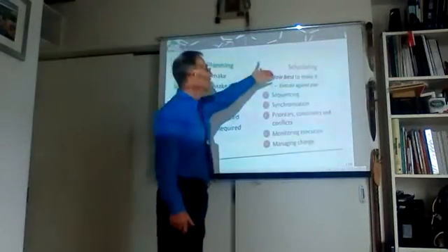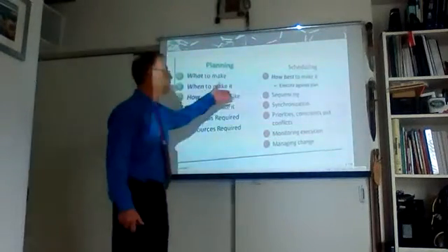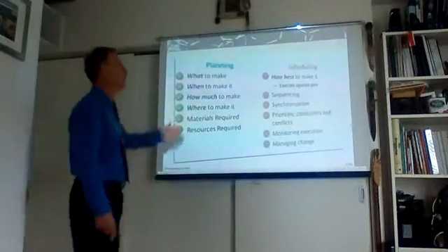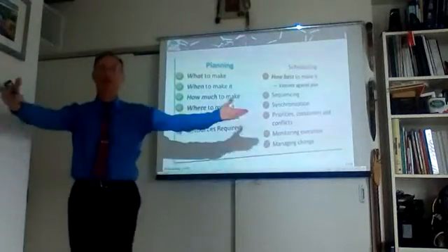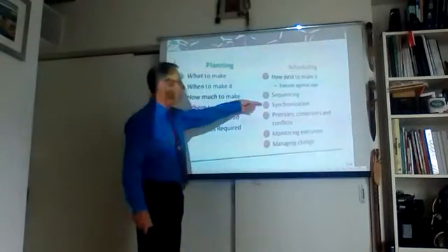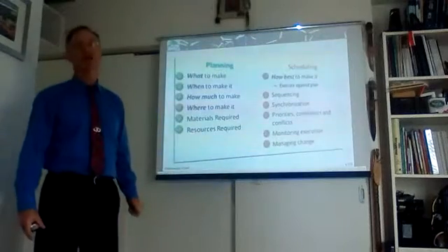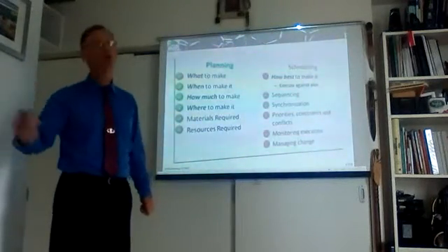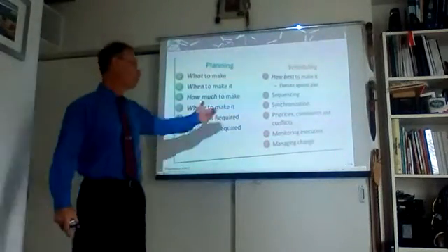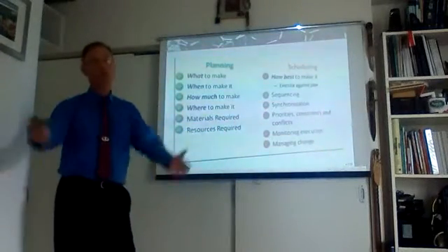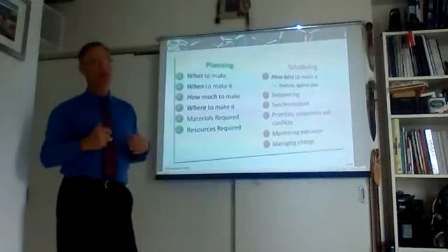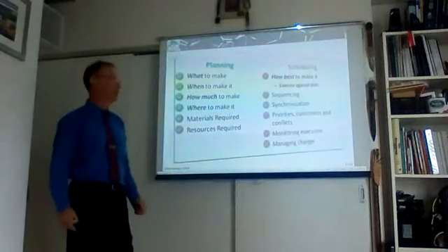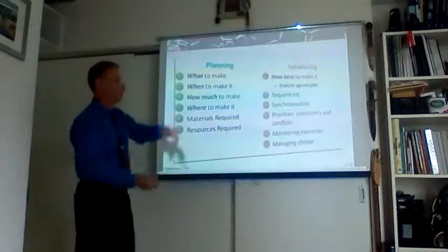When it comes to the scheduling, how best to make it? What is the right sequence? What comes after A? B, and then C, and then D. Very important. You are the expert. You will do the scheduling. Synchronization between departments and professionals. You know that you're supposed to disassemble a special oil pressured coupling. Is there an electrical connection there? Oh yeah, I forgot. Okay, so do we have to call the electrician to help us out? Yes. Do we need an inspection when we later on reconnect it? Yes or no? Then we have to prioritize what comes first, what comes next, what is more important, what can be done in parallel.